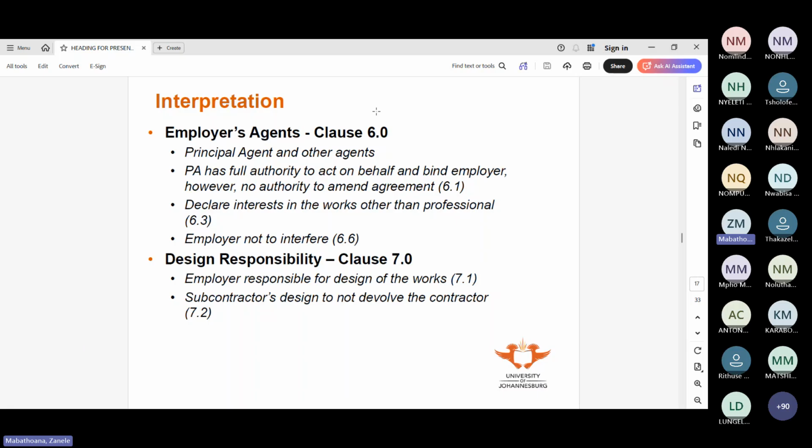So now when you look at it, there is no contract between the contractor and the principal agent who instructed him. So it's not like he can just take the principal agent to court and say, this guy said I should do this work, therefore he owes me. The contract was between him and the old lady who wanted her house renovated. And now you ask yourself, what recourse does he have? Because now he's lost in court and, sorry, sir, that money you spent, this lady's not going to pay it. She's just told you she doesn't have it. You should have waited for her to come back and tell you that you can proceed.